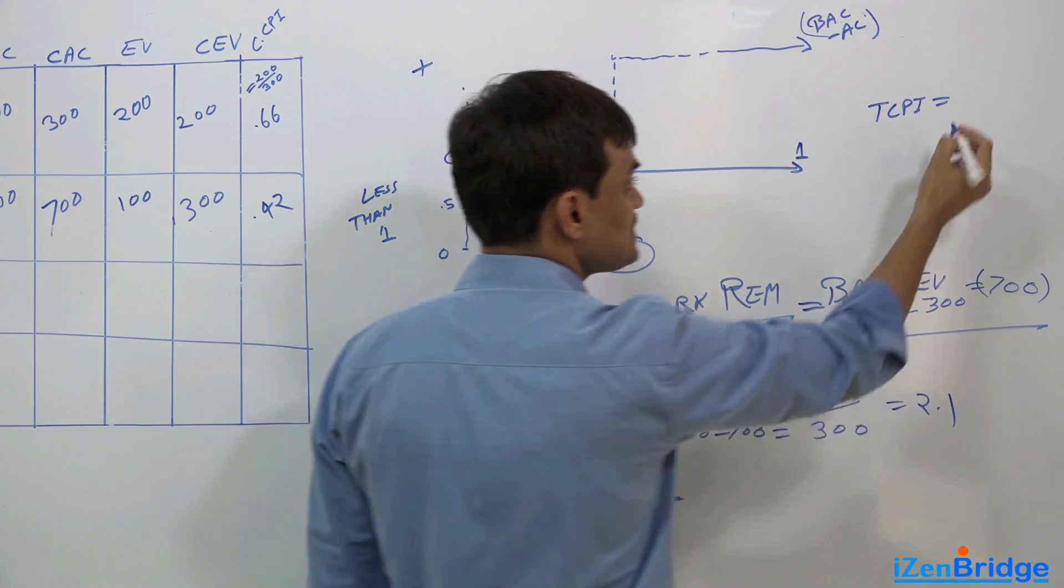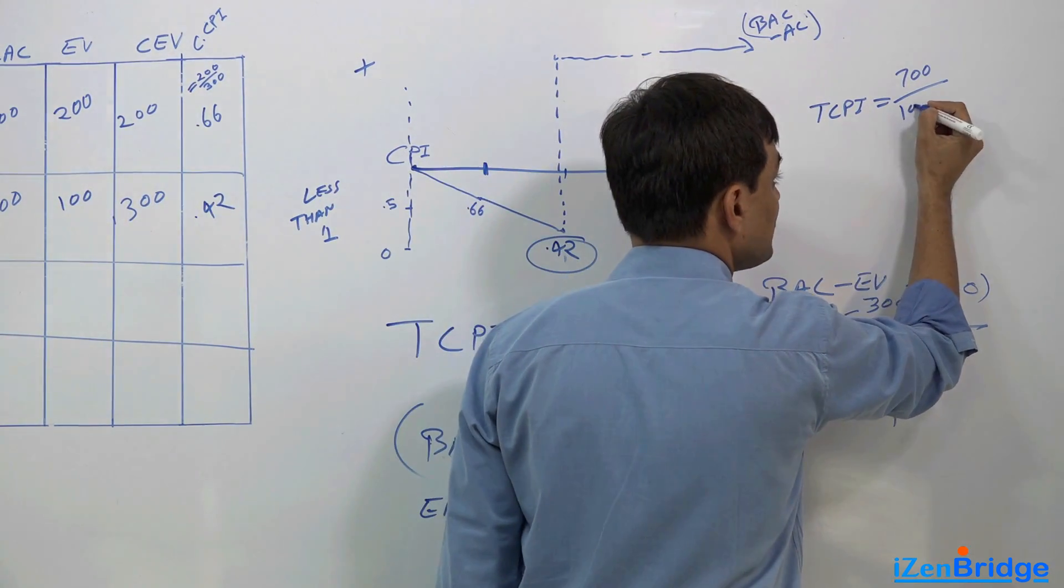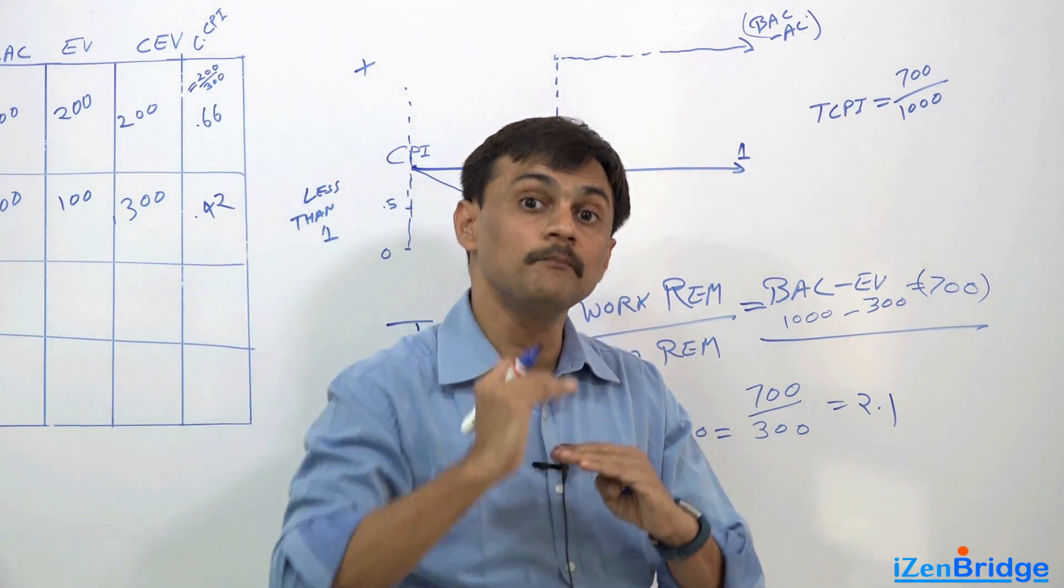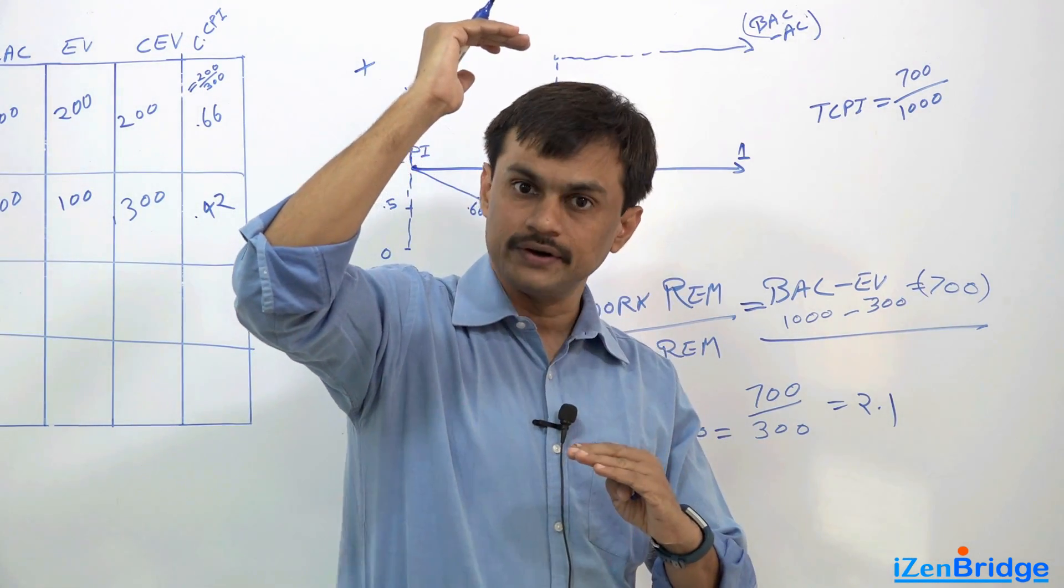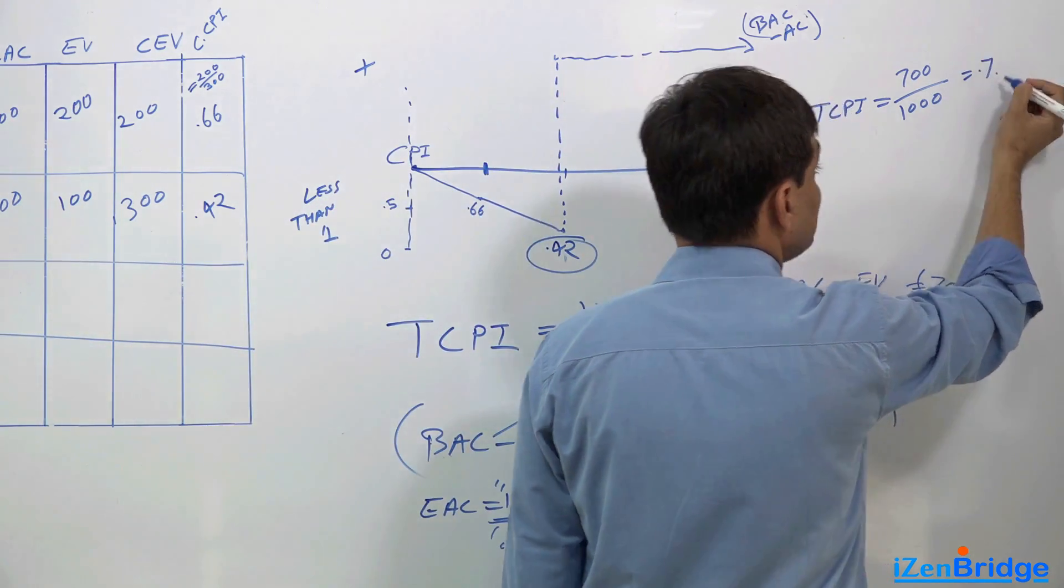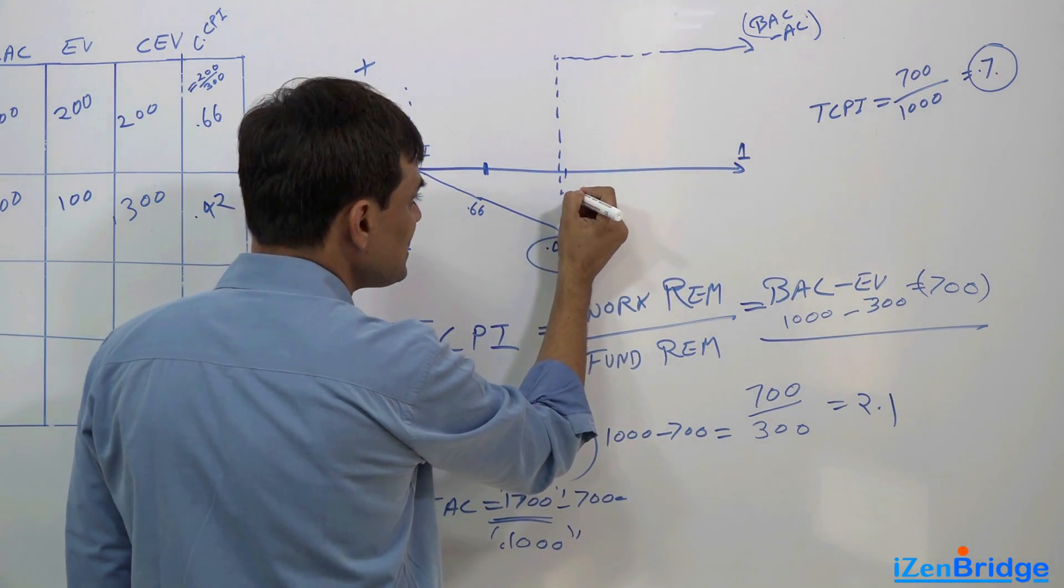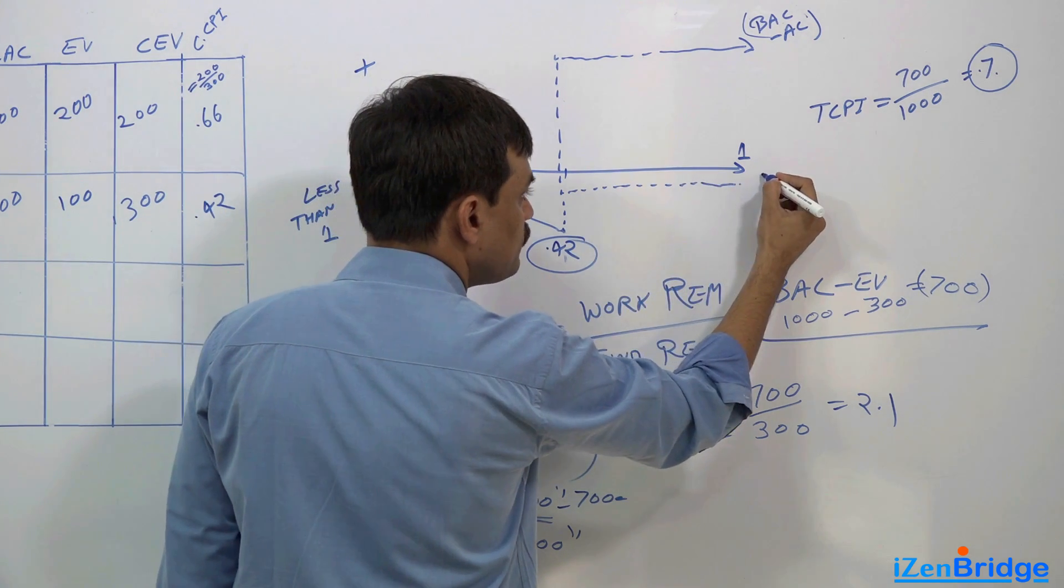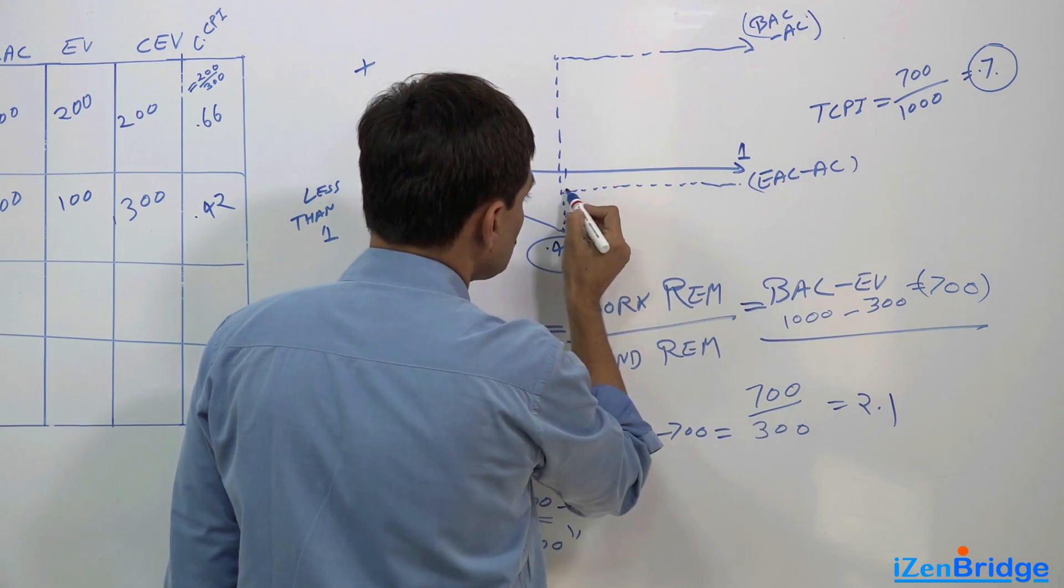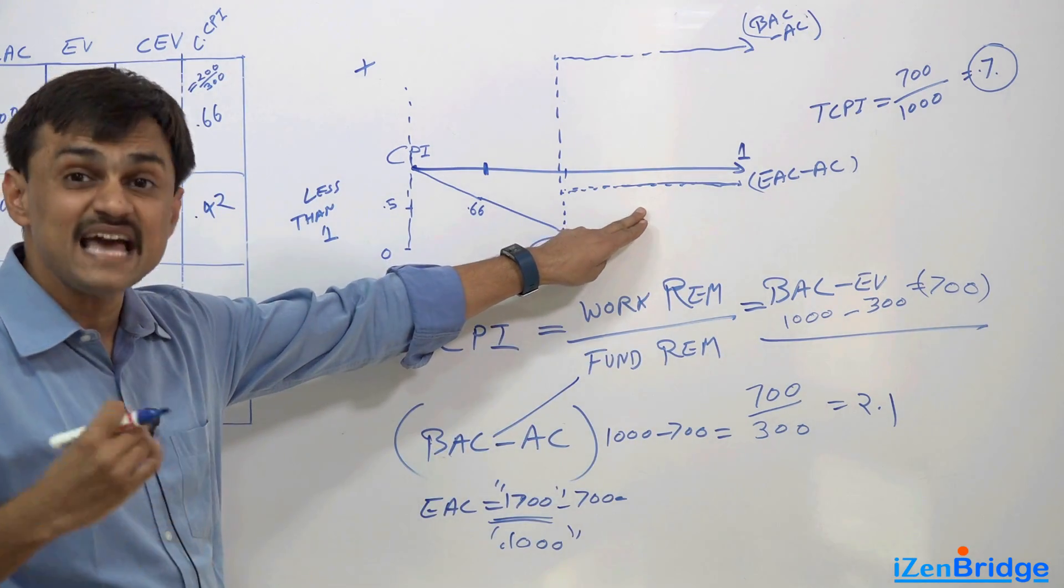Then my new TCPI by using this particular formula will become - my work remaining is $700 only, but company has given me more money to finish it. My fund remaining is $1000 now, because my initial budget which was $1000 got pumped up by $700. And in this case I'm thinking of achieving 0.7 cost performance index. In that case you are somewhere here. So even if you remain with 0.7, you still achieve your project goal in the remaining fund.